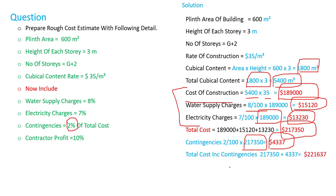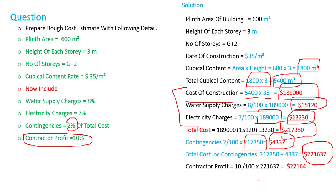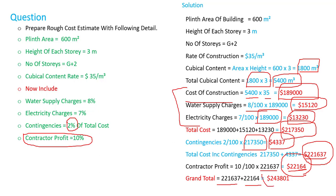The total cost including contingencies is calculated. Next, we add the contractor profit at 10%: 10 divided by 100 multiplied by the total cost including contingencies. The grand total equals the total cost including contingencies plus the contractor profit. This is the approximate estimate according to the cubic content rate method.